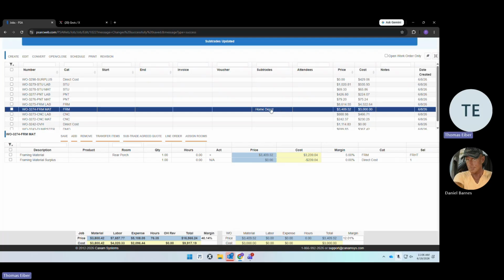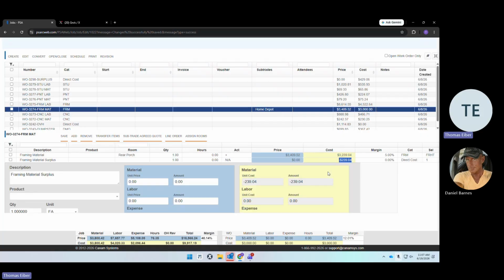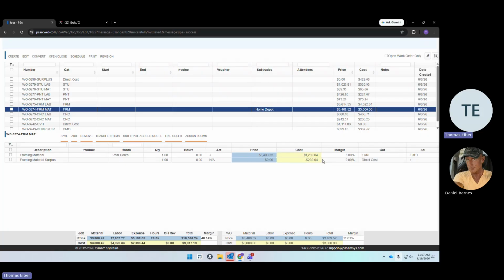So this is earmarking this money without closing it and saying, I expect to spend $3,000 at Home Depot. I've already taken out the money I don't expect to spend. My cart's about $2,995, but I'm going to leave it at $3,000. So with this money allocated here and the vendor assigned, next we have to close this to be able to spend it.